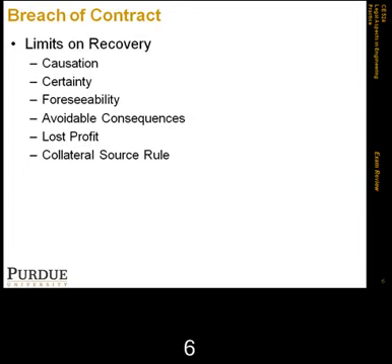They're not off the hook, basically. But through subrogation, of course, the insurance company will go after that breaching party. But the idea is that if you recover some money from collateral sources, the breaching party in your case is still liable for the amount of money you lost.